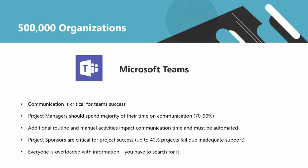Another aspect is the same for project sponsors. Their involvement is critical for success as well. In the latest Pulse of the Profession by PMI in 2018, they collected statistics showing that even in high-performing project management organizations, about 20% of projects fail due to a lack of project sponsor involvement, and for companies with low maturity and low progress, that number is about 40%.